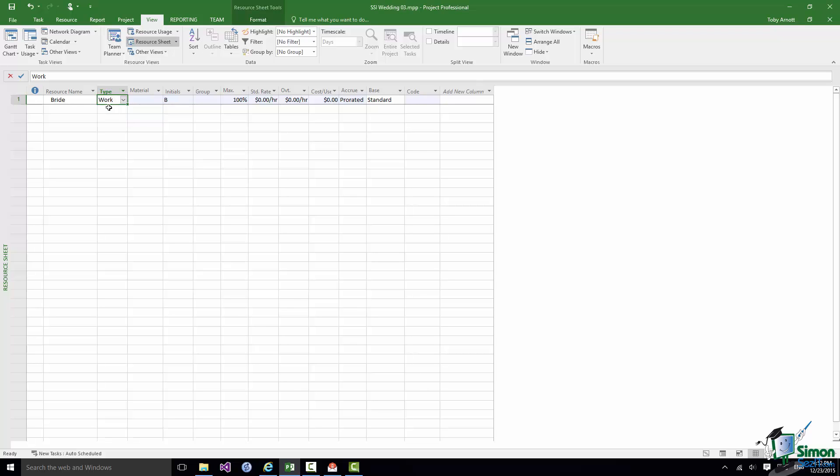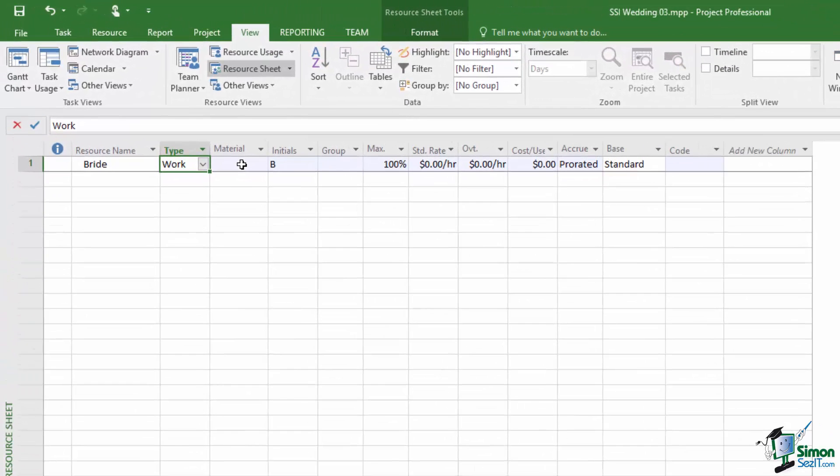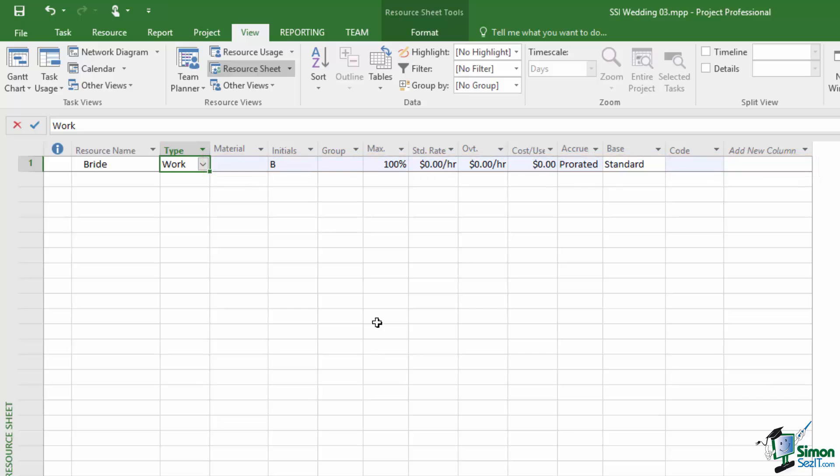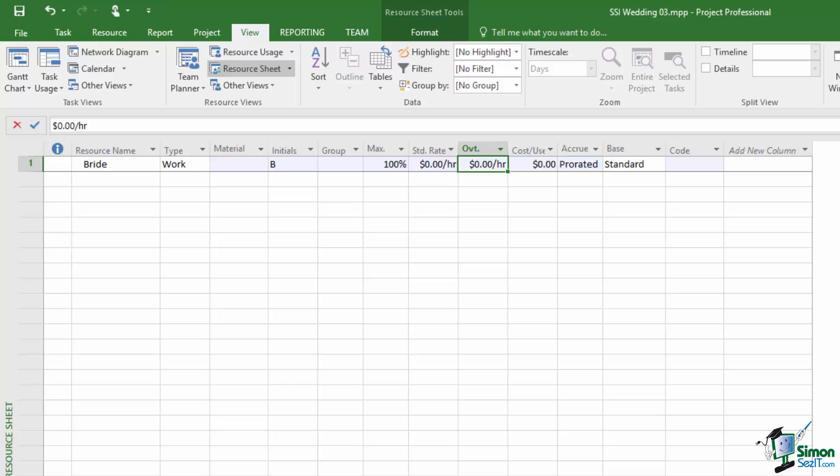When I choose a type for a resource I will get a different accessible selection of properties here. So for instance when I declare that a particular resource is a work resource I can specify their standard rate and the standard rate here is $0 per hour and I can specify their overtime rate. As I mentioned the bride is not going to be charging for her time on this project so we don't need to assign a standard rate or overtime rate for the bride. We do however need to declare how many brides we have and we only have one and she is represented by 100%. If I were dealing with say bricklayers and I was building a house I might say I've got three bricklayers so that's 300%.